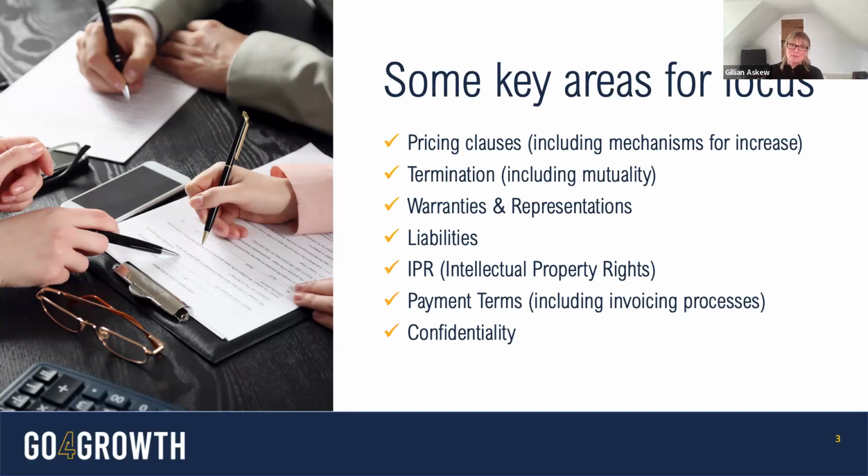Those reasons why termination for cause can be invoked will be laid out in the contract documentation, but it's usually around a breach of contract of some sort, especially a breach that has gone unrectified, or is of a serious enough magnitude that it would require immediate termination. If there are grounds for immediate termination, any of those grounds should be explained in the procurement document so that you understand what the conditions would need to look like for termination to be invoked.